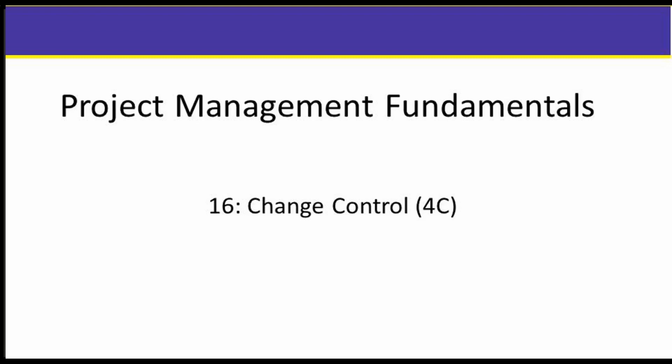So change control is one of those things that definitely needs to be communicated to set expectations in the beginning. If a change has to be made, I'm not going to say no as a project manager, but what I am going to say is, what's that going to cost? How long is it going to take to do that? And is this an integral part of us producing this scope? If the answer is yes to all of that, then sure, we will integrate that in, but we also will be able to change that triple constraint as well. Sometimes it's me saying that that's okay. Sometimes I have to take it to the sponsor. Sometimes we have gates, like if it's over $10,000, it's got to go to what we call a CAB, a change control board.